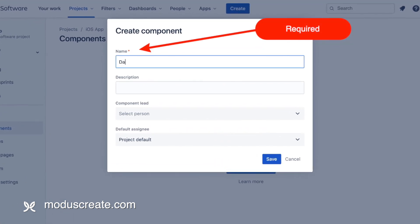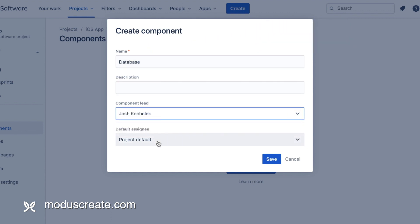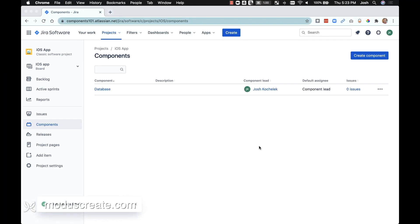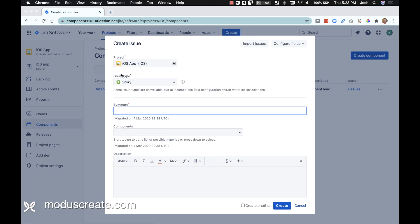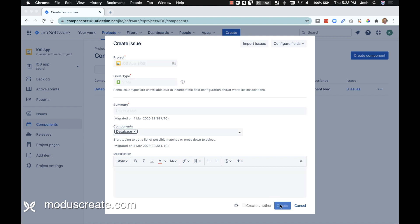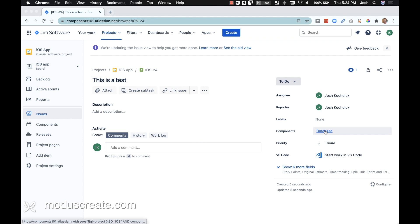Give it a name. We'll leave the description blank here. And with components, like I said, we can select a different default assignee — and we're going to select the component lead. You can see our new component is set up with our component lead. We'll create an issue quickly to see what happens. Create a new issue in our project, select the component, and hit create. Check it out — we've got a database component, and it assigned it directly to the component lead. And that covers it.